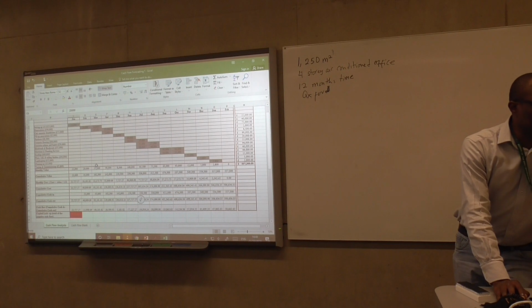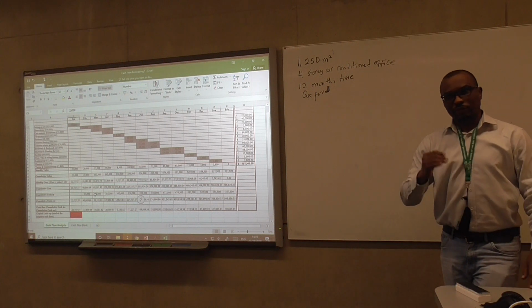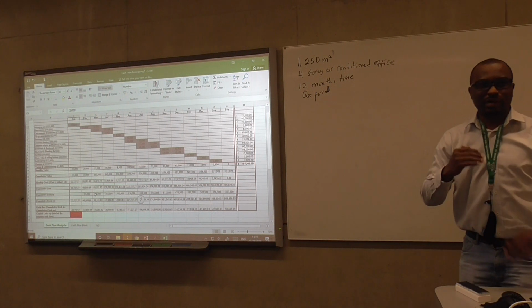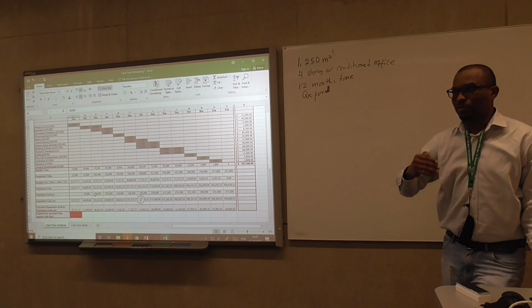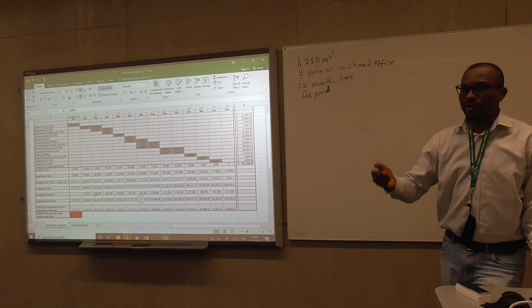So in March, the total value of work done by the contractor is 57,000. You also know the cash that will come in, 45,000. So once you do this from the contractor's perspective, you have an idea of, at every point in time, how much you, the client, will need to pay the contractor.